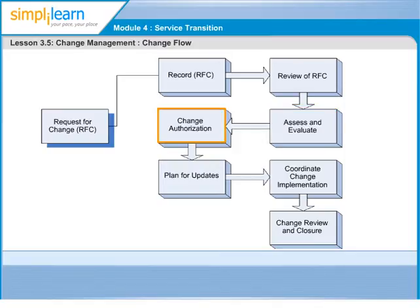This is authorized by the change manager. While the responsibility for authorization lies with the change manager, the change requester will ensure approval across three main areas: Financial approval — what's it going to cost, and what's the cost of not doing it? Business approval — what are the consequences to the business, and of not doing it? Technical approval — what are the consequences to the infrastructure, and of not doing it?